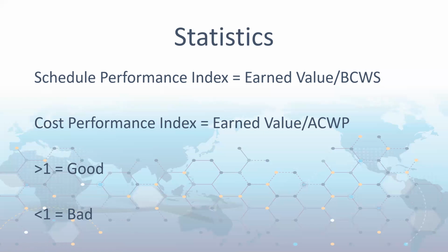I mean, the key here is you're 15% into a job as far as time goes and schedule, but you've only earned 5. You really need to start working, and maybe you've spent close to 15%. You need to start working out why, and the earlier that earned value can tell you that, the quicker you can have those discussions with the team, with the client.